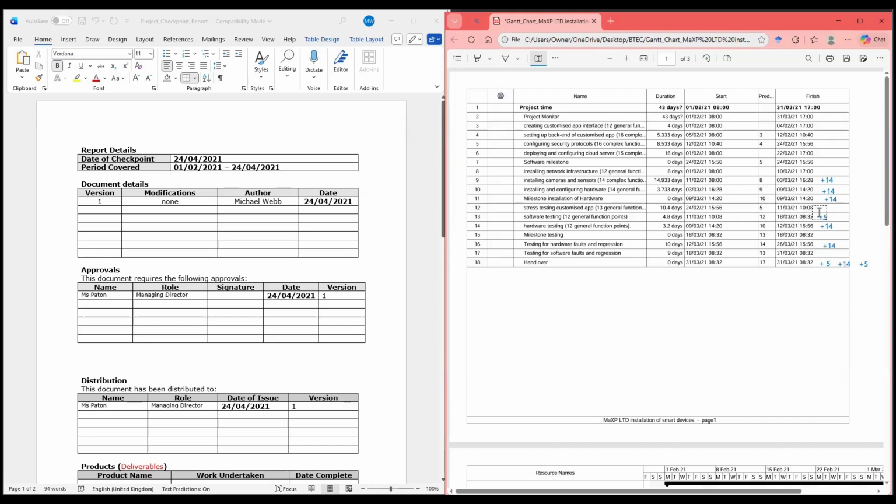All right, then let us look at all of these dates here. So that's 5. Let's see where the 5 is. 12 is affected, so that's 13. So this is plus 5 because this here, which is a milestone, has to be pushed out because 13 would be affected. 15 would be affected by 13, which is a plus 5.